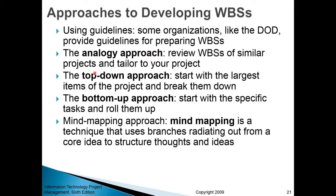First, there's the analogy approach: you review work breakdown structures of similar past projects and tailor those to your own project. Then there's the top-down approach, where you start with the largest item — the overall goal or scope statement — and keep breaking it down into smaller parts until you have work packages.